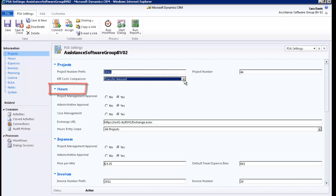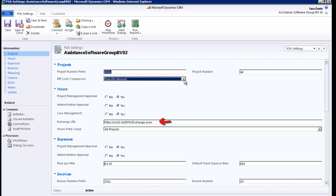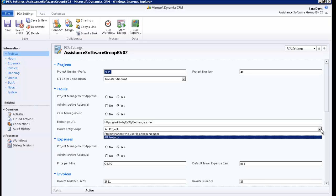In the next section, you will determine if you want project management approval and/or administrative approval on your hours. Case management is also an option here. If you click Yes, your cases will be linked to your timesheet. The Exchange URL field will allow the connection to the Exchange server for the retrieval of your Outlook appointments into your timesheet. For more details on this field, please refer to the installation document. The Hours Entry Scope field will determine if your employees can post hourly entries to all projects or only to projects where they are team members.